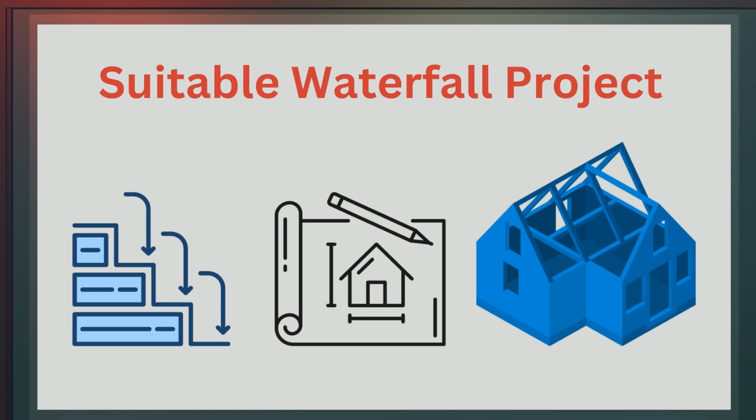What projects are most suitable for waterfall? Ones which are well planned and need things to be done step by step that should not face large changes that will affect the project's success. But just because it is step by step doesn't mean it is easy. Building a house is not easy, but it is the most common example given for describing the waterfall methodology because of how sequential it is. You lay the foundation before you lay the bricks. You build the walls before the roof, etc.